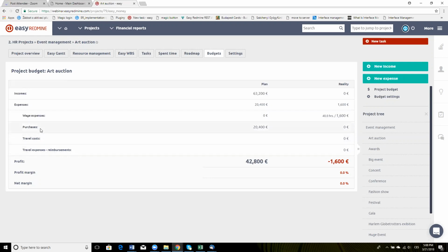Well, I will specify this term of personal costs. In the system, the cost of the work of one employee or user is calculated as the spent time of this user multiplied by a certain cost rate, which is linked to this user.